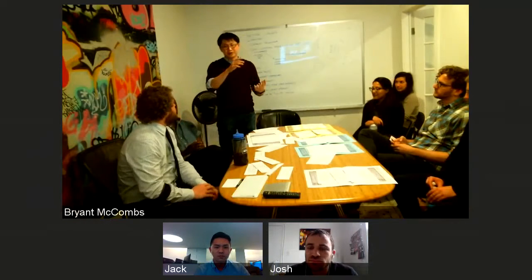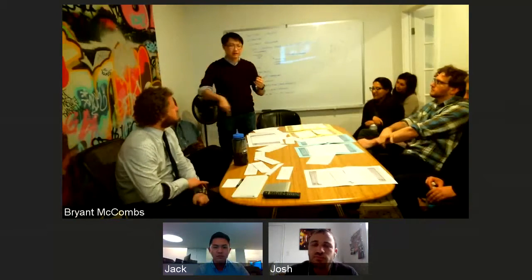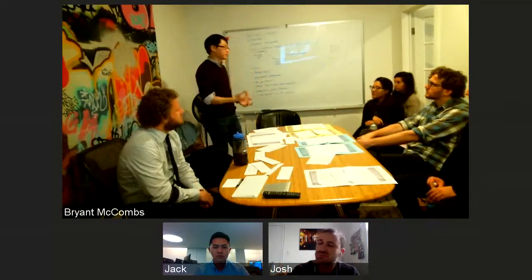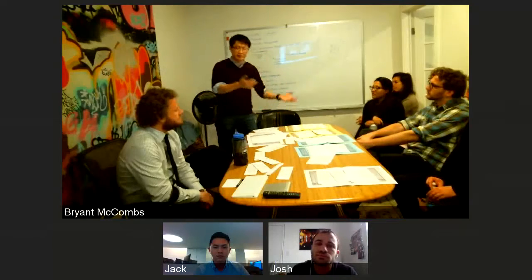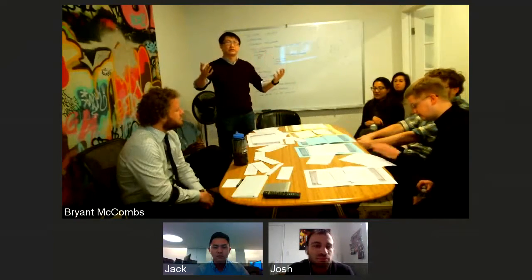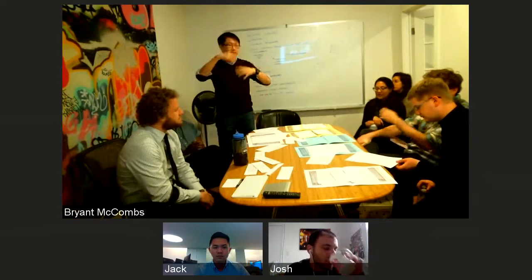It kind of goes from an estimation to show and tell to planning game, and then it loops around, because the show and tell is so that they get a sense of where you are, so they know what needs to go into the next plan. Estimation comes before that to make sure that all the plan is up to date in its size and scope.